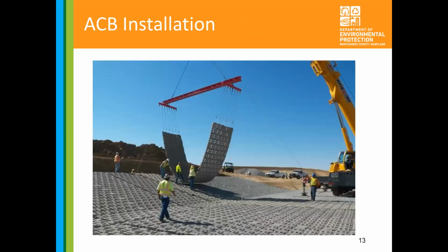So during construction, this is likely what you're going to be able to see, mostly towards the end of construction. As you can see, there's the dirt, the gravel layer, and then it's going to be trucked in on 18-wheelers in these mats, and then cranes will have to come in and lift these mats right up and place them in. So installation of these should be pretty quick once the gravel layer is put in place. So shouldn't be too much extended period of time for the noise associated with that.